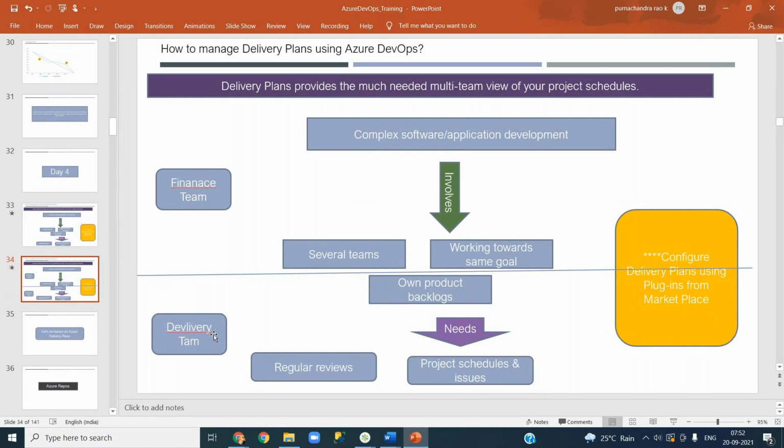It is just a concept for better understanding of the activities, the responsibilities, or who can deliver what in your workflow. For that reason we create swim lanes like this. This is one swim lane, this is another. So people will come to know, I have 10 different activities in my workflow: these two should be done by the finance team, these three by the delivery team. That's the advantage of the swim lane. It's all about tracking purposes again.